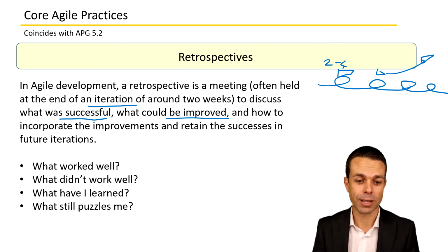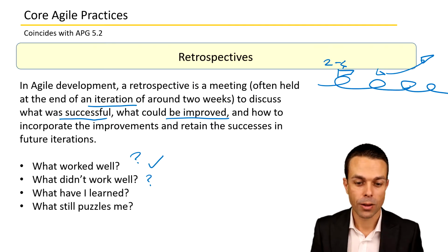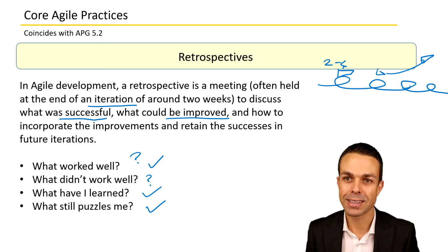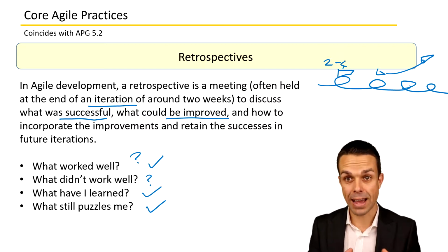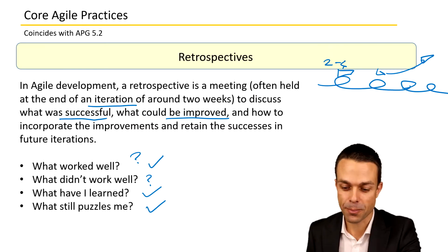So we ask ourselves, what worked well? What didn't work well? What have I learned? And what still puzzles me? And by asking these questions and putting the feedback that we're gathering back into our process, we are continually improving.